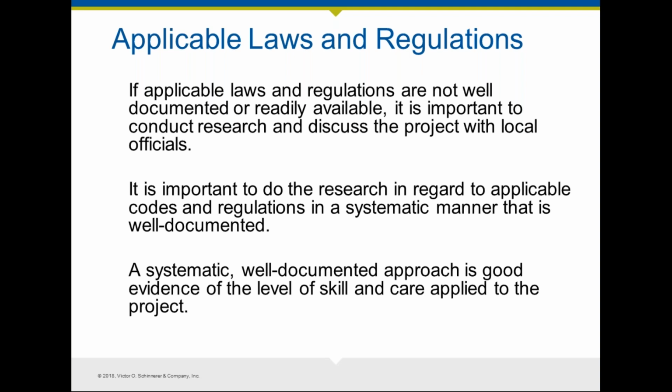there's often a need to go in and actually discuss the project with local officials, because even though the laws and regulations may be available online and may be readily available, how those are interpreted and how those are actually implemented is oftentimes not readily available online. So anytime that you need to flesh things out and how to get things done in a particular county, especially if you haven't worked there before, it's important, I think, to go in and establish relationships with the folks who are actually reviewing the plans when you're helping the client pull the permits.